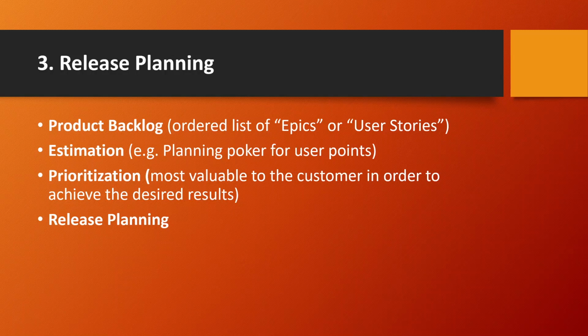So what I mean by this is that planning poker just assigns an agreed number to each item, representing its size and complexity. So like thinking about meritocracy, there's a lot of team members that are going to assign these numbers, so senior engineers, product managers, designers, etc., and depending on their experience and knowledge, they're going to have different weights.